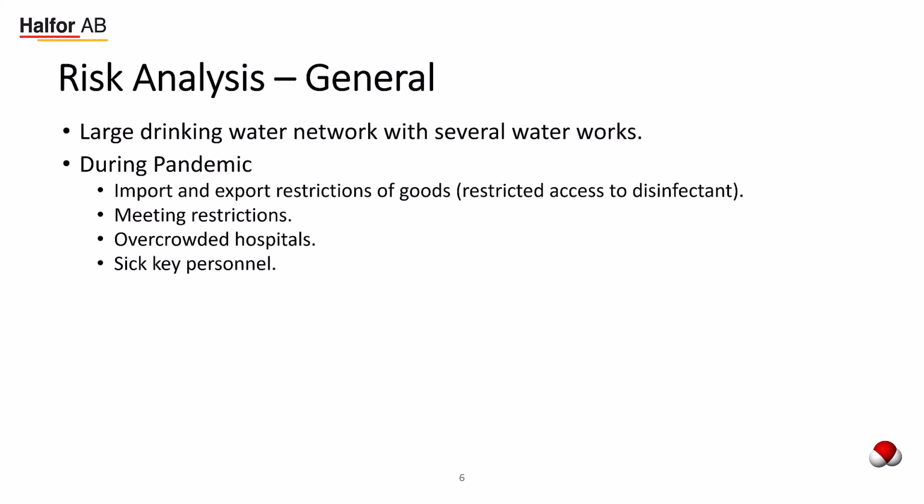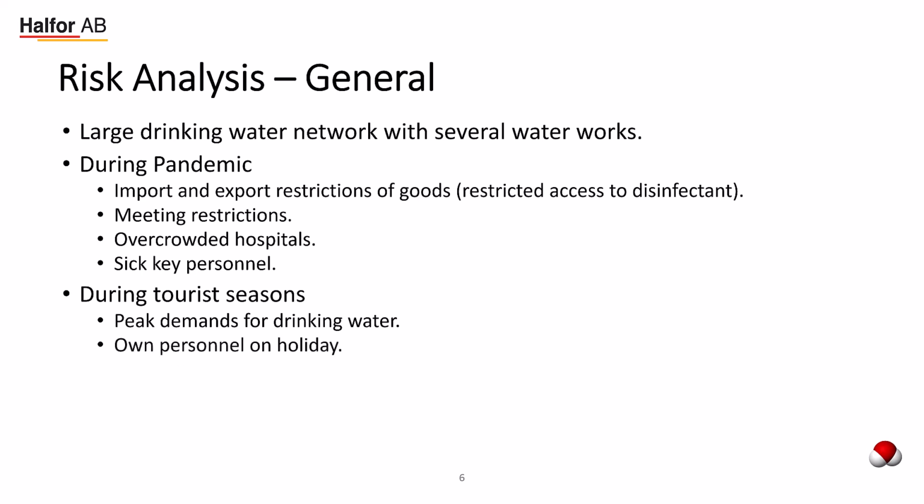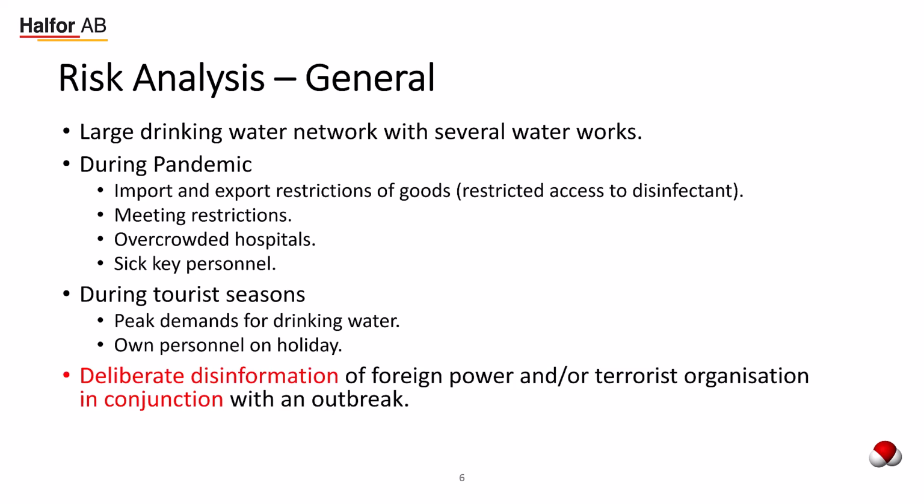Then we have another risk, that is if it happens during the tourist season, when you have peak demands for drinking water. In Gotland, this is during the summertime. Going up north in Sweden, you have ski resorts where you have a peak demand during wintertime. And then when you have holiday season, your own personnel could also be on holiday that you need to consider in regard to the risk analysis. Furthermore, deliberate disinformation.